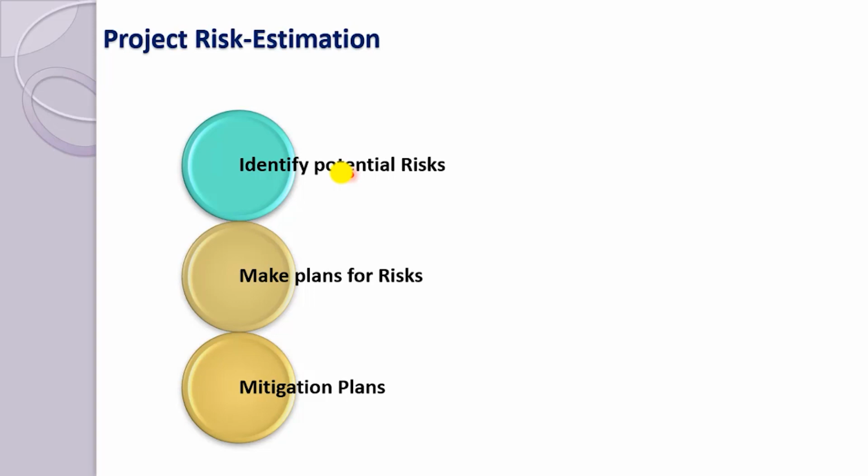So what are the stages of the risk management plan? The process is, first you identify the potential risks, then you rate them by likelihood and severity and choose which risks to plan for, because there could be risks which are very severe. Some application has gone live and there could be some defects which need to be fixed immediately, so they are very, very severe issues. Or there could be a core team member who is leaving and the entire component deliverable is dependent on him or her, and we need to deliver it.